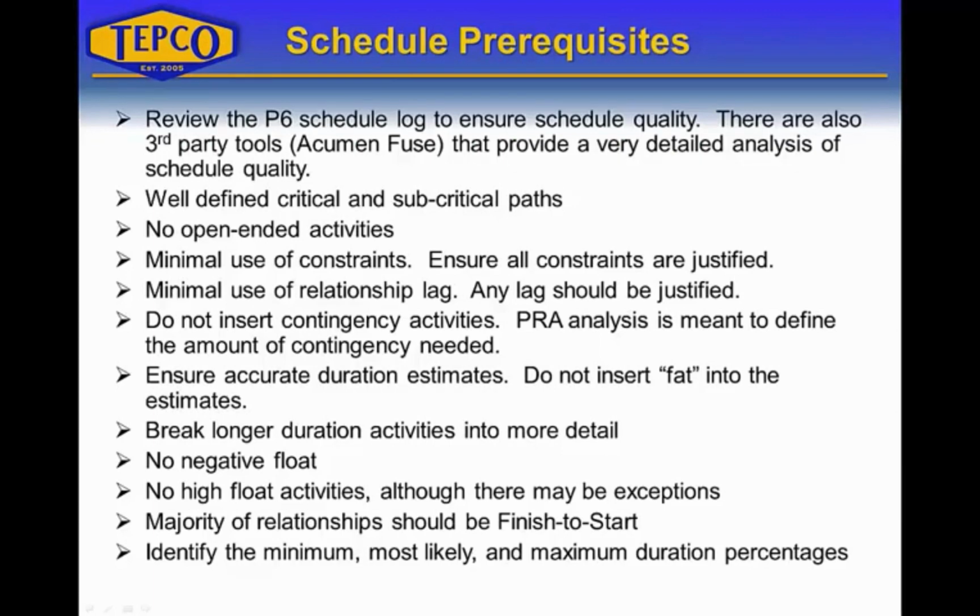If you have long duration activities, break them into more detail. The longer the duration, the more effect it can have in the Primavera risk analysis when it goes through and does the analysis and reduces and increases the durations. It's a much bigger impact on longer duration activities.